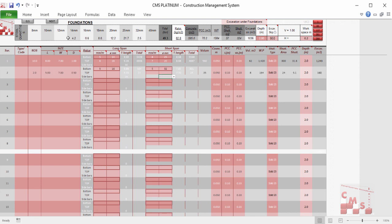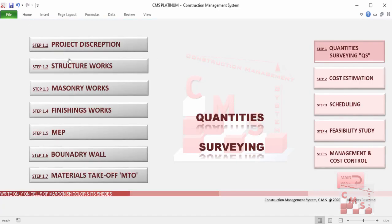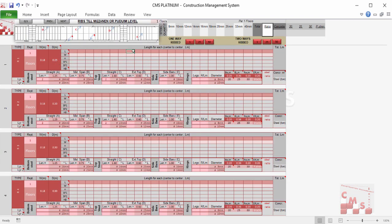In the course videos, we'll know exactly how to do this step by step. The same can be done for all substructure and superstructure work, and all outputs from CMS will be reflected directly in all other project aspects. For example, for a ribbed slab, we just enter the length and width of the slab and the reinforcement of the ribs. CMS will provide directly the number of ribs, solid parts required, and the number of hardy blocks required, plus all rebar details, concrete quantity, and block count — all automatically.